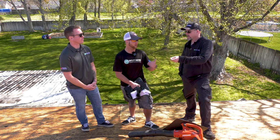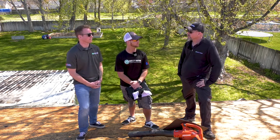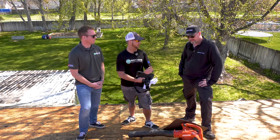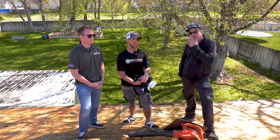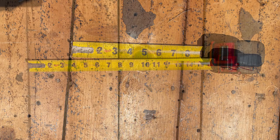Because if your homeowner doesn't have building code upgrade built into their policy, your homeowner is now on the hook for, what's a typical re-roof going to cost? Right, so again, us teaming up, the quality control rep, the project manager, his side of things, I think he just mentioned it. He's going to get in contact with his homeowner, find out if they have that BC coverage, that building code coverage. And then as the quality control, we're going to get tons of photos and not just photos of the gaps. We want to pull out our tape measure and actually measure those gaps and document those photos as well.